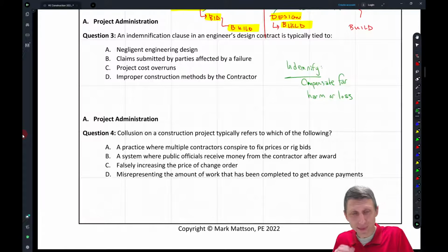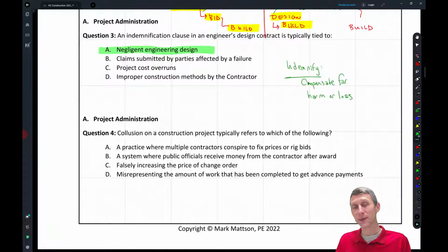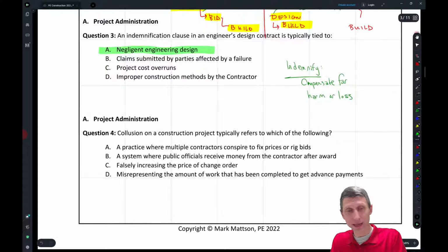See the difference? So that's where indemnification really starts with this. It needs to be tied to negligence, and that's where, if you talk to your professional liability insurer or whoever, negligence is really key in holding that and tying it so that it has some teeth and that it's enforceable. Because insurance companies don't just want to pay for claims, they want to pay for actual things that happen.